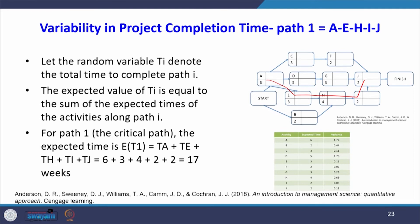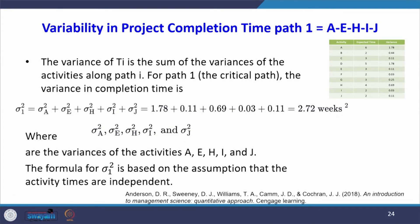Let the random variable T1 denote the total time to complete path 1. The expected value of T1 equals the sum of expected times of activities along the path: 6 + 3 + 4 + 2 + 2 = 17 weeks. The variance of T1 is the sum of the variances along path 1: 1.78 + 0.11 + 0.69 + 0.03 + 0.11 = 2.72. We must sum variances — not standard deviations.